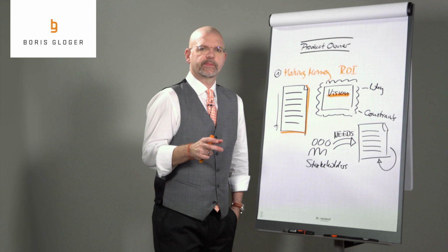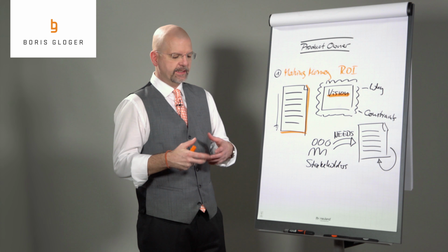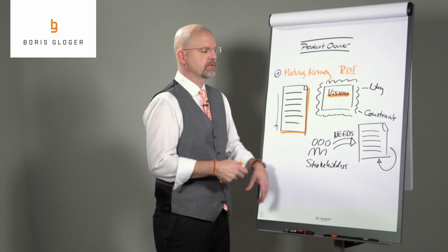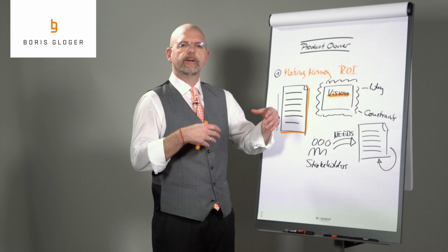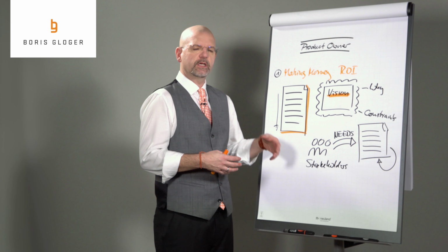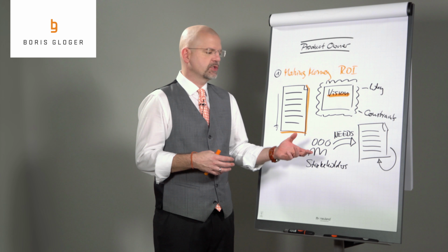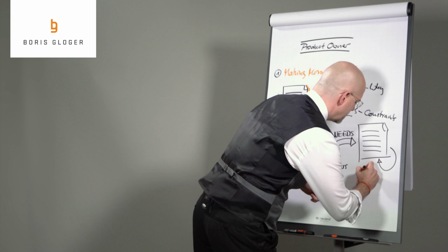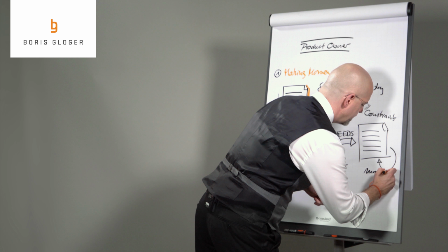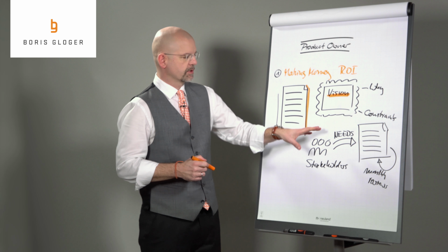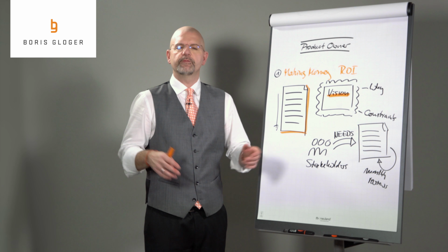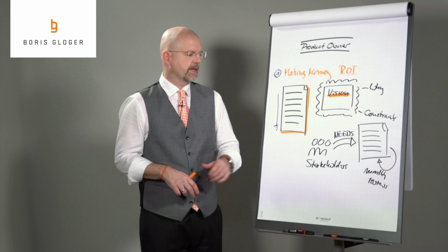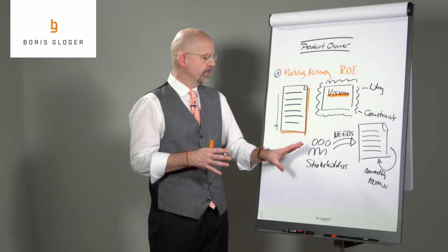One recommendation, and I think that is really important: it's not enough just to talk once to the stakeholders and create a list of constraints. It is much more important to frequently update the list of constraints by talking again and again to the stakeholders. My recommendation is to have monthly reviews with your stakeholders about the constraints, and maybe nothing changes, so all constraints and all needs stay the same. Then it's a 5-minute job to do.